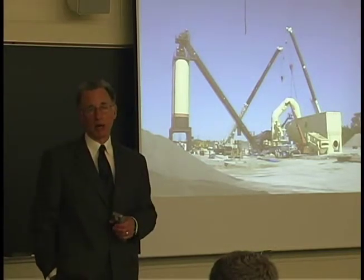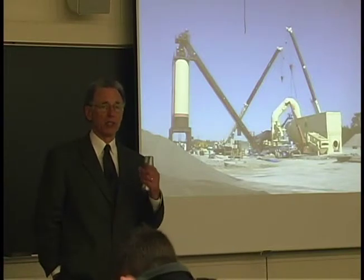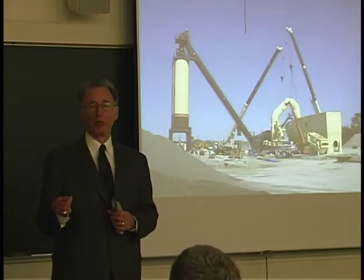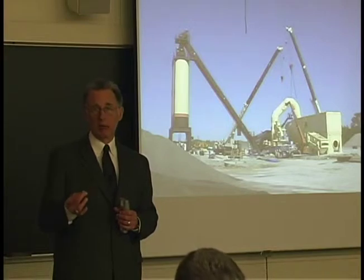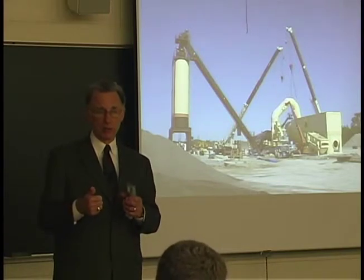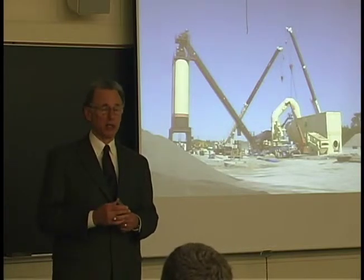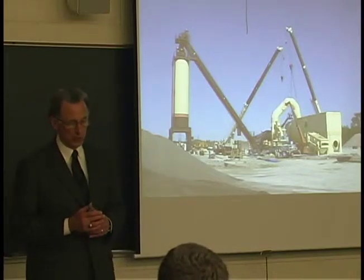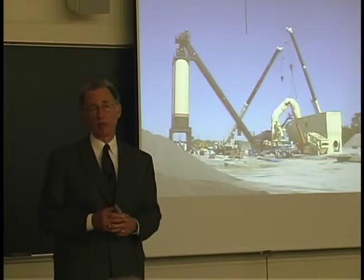We set up a whole office down at Casey. We had a project manager. We had support staff in that office. We had project superintendents on each one of these operations. In other words, we'd have a project superintendent on raising the bridges. We'd have another one on rebuilding the bridges. We'd have another project superintendent at each of the paving operations. So, if something happened, obviously it was that superintendent that was the first, I guess, line of defense. We had mechanics on the job full-time, and so they tried to coordinate it, and the project superintendent was the one that, if it got beyond the project superintendent level, then the project manager got involved.